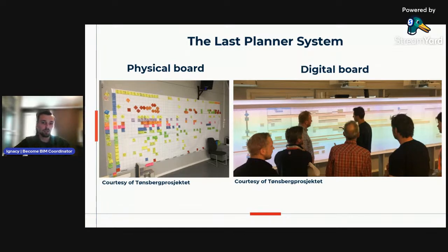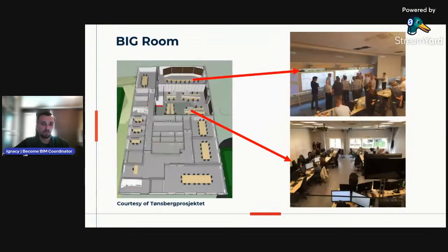And here in the pictures, we see that teams meet weekly to plan the upcoming week using sticky notes. They use a tool called work plan to identify what work needs to be done, who will do it, and when the work will be completed. As you can see here on the left, we have a physical version of the planning board, and on the right we have a digital version of it, which was displayed on the huddle wall, which I'm going to talk about a little bit in the coming slides.